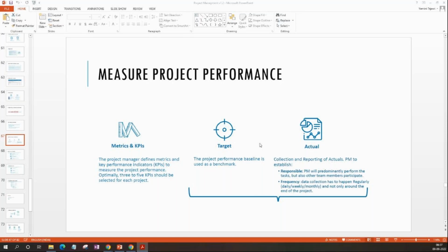For example, when it comes to construction, most of the quality standards are set by regulation, right? So the standards to be met are many and require engineering expertise to be properly managed. Examples of regulation topics are structural stability, fire safety, air ventilation, drainage, electrical safety, all these things. Meeting the quality standards is crucial to the project success, as the building may not get the needed approvals or authorization documents if not met. Correct? That's the construction example.